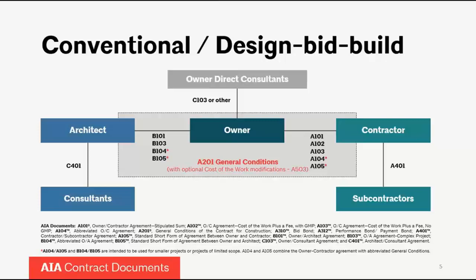That's the relationship in the conventional design-bid-build delivery model. For those not familiar with AIA documents, the C-103 refers to an owner-consultant agreement. The B-101 and B-103 are our conventional owner-architect agreements, and so forth. Those numbers and letters all represent various types of agreements that solidify or create contracts for those relationships — owner-architect, owner-contractor, and contractor-subcontractor, which would be the A-401.